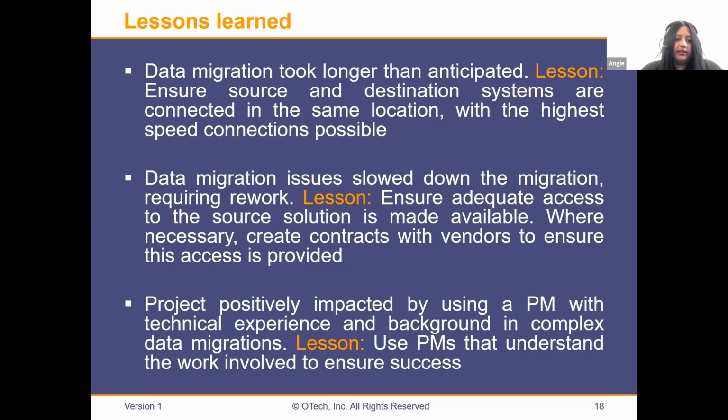And then the last item. This one is a lessons learned, but it's a positive lesson learned, and something that was great for this particular project: utilizing a PM for portions of this project with very explicit technical expertise and background in complex data migrations. That really helped the success of this project. Using PMs that understand the work for very complex projects to ensure success is an excellent lesson in a positive light.